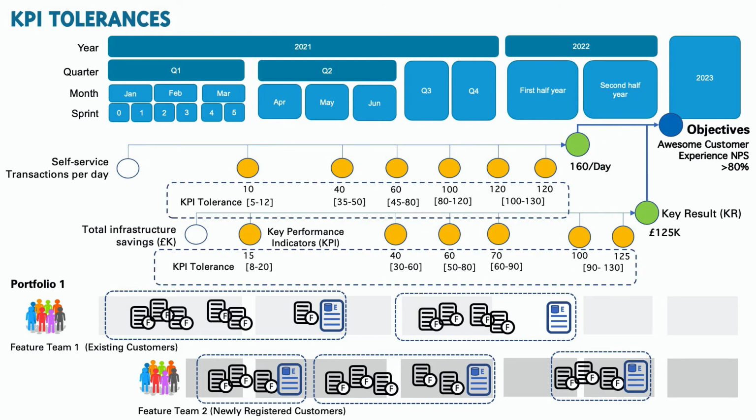Once the individual Agile teams have added the appropriate objective assessments to their product backlogs, mature Agile teams will agree with their stakeholders and senior sponsors a series of KPI tolerances. KPI tolerances provide guidance to an individual team, empowering them to take any actions they deem necessary without first consulting with their stakeholders and senior sponsors as part of a formal escalation process.